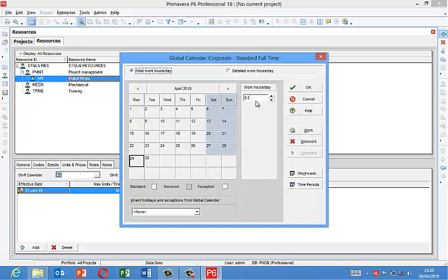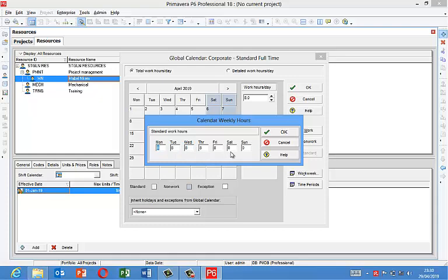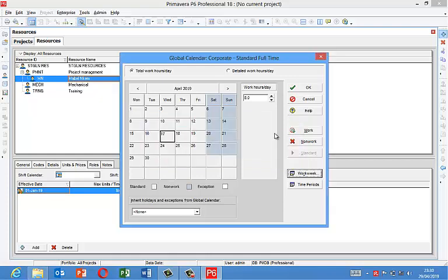Okay. Mabel is working 8 hours per day. You see this total work hours per day is checked. Then see when she's working, Monday to Friday. Just click on the work week with 8 hours. Maybe if I want her to work 9 hours on Thursday, you can do that, then make her work 7 hours on Friday. Just to show you how to adjust. Click OK.